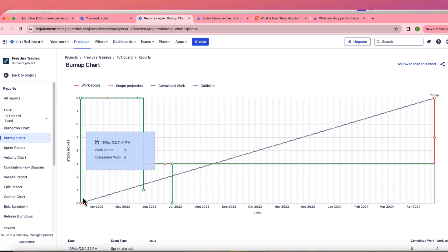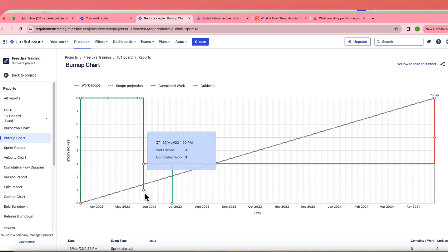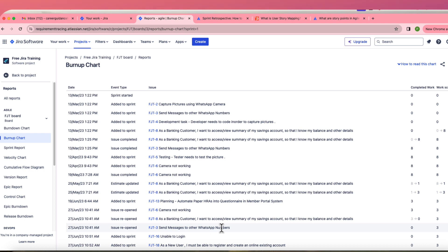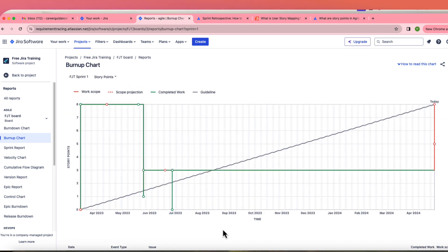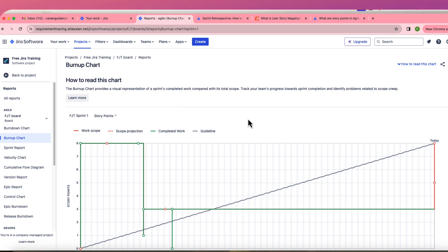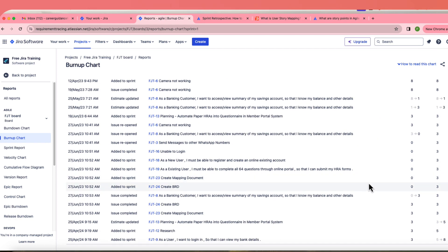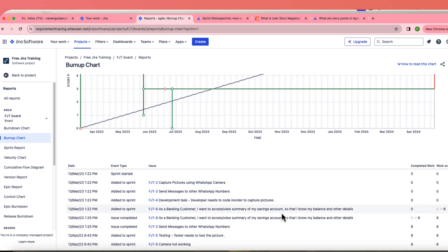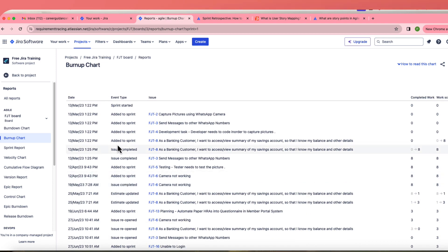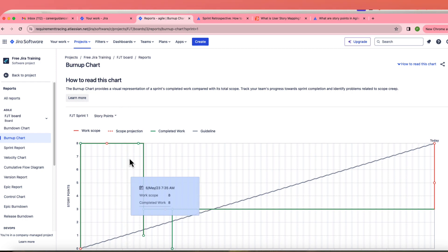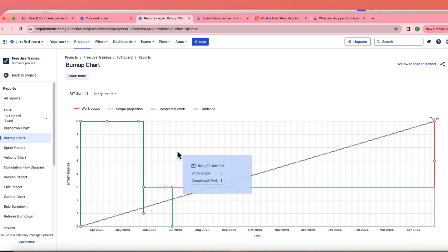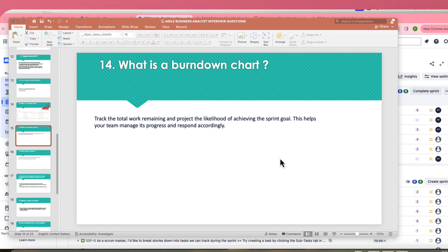In a burn-up chart, the axes are story points versus time (monthly or per sprint). The software automatically tracks progress based on whether user stories are in-progress or completed, using story points. You can monitor whether the sprint is progressing well or falling behind without any manual tracking.